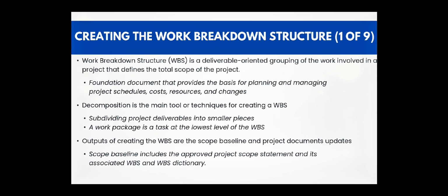Because the work breakdown structure defines the total scope of the project, some project management experts believe that work should not be done on a project if it's not included in the work breakdown structure. Therefore, it is crucial to develop a complete work breakdown structure.